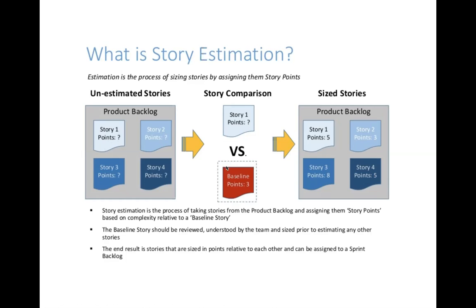development. So when we are taking the tasks relatively, most of the tasks we already covered in the 3 units, and now we have created two more tasks for the current user story. So we are adding more story points on this new user story. Okay, it's like we have baselined the tasks, and in case there are other tasks, we'll add more points. Exactly.